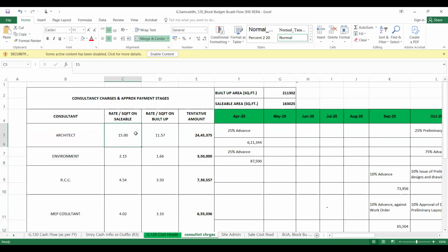You have dealt with them with some amount, whether it is per square feet rupees, or whether it is lump sum, or whether it is with any other transaction. So here all business is on square feet, because if you take real estate, for example, the entire thing is dependent on square feet cost. Now, based on sellable or based on built up, because the area is different.